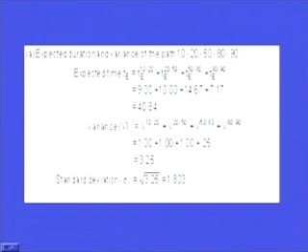So the variance of each and every activity is added to get the complete variance for this particular path. And similarly, when the variance is known, very easily we can find out the standard deviation also. So what is the need of finding the variance and standard deviation is that the time is distributed over a